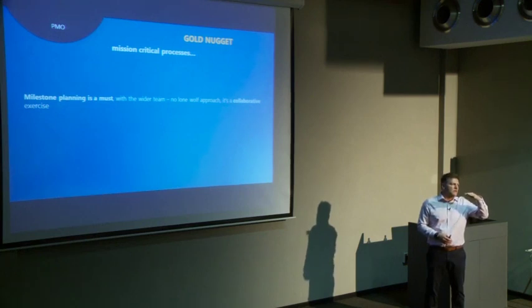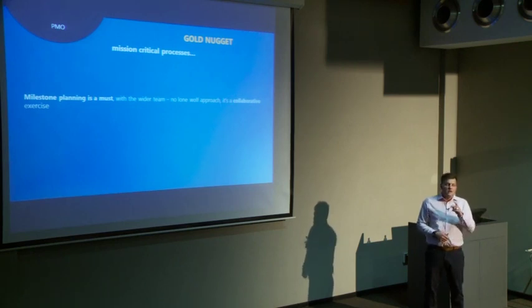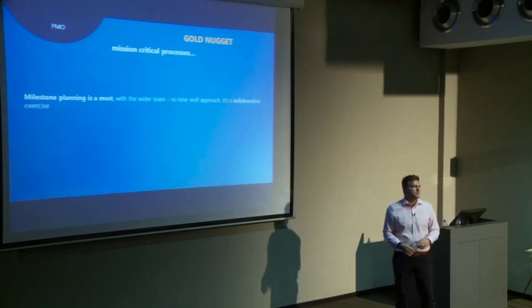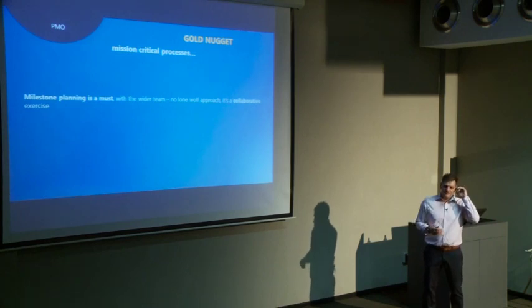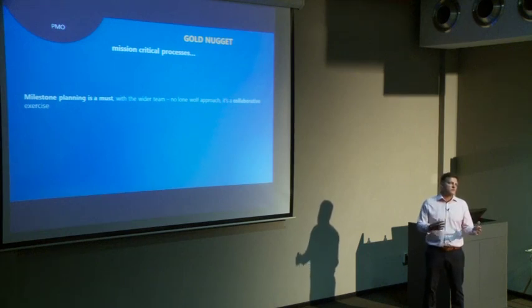We'd have to sort out and aggregate that information, and then we're not just the guys that are going to take that information, make it ours and report it to Exco, because that's not the way things operate. To avoid that way of working, you put all your time and effort in at the beginning of a project, very early on, into the planning phase where you're doing your milestones. Then you put it onto whatever system you use. We use MSP. It's pretty easy to use. I mean, Microsoft Project is almost like Excel, but not. So we use that to manage those big milestones, and then we use the steer codes and the reviews to update those milestones, call out risks and make course corrections.